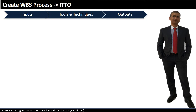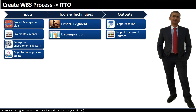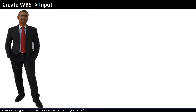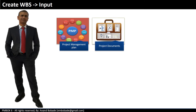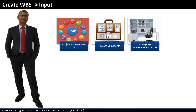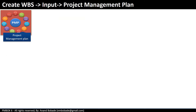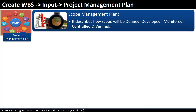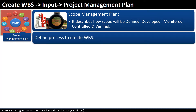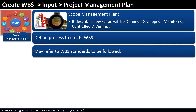Let's take a look at inputs, tools and techniques, and outputs. One of the key tools and techniques we are going to learn here is decomposition. The inputs are project management plan, project documents, enterprise environmental factors, and organizational process assets. The most important component of the project management plan that is input to this process is the scope management plan. It describes how scope will be defined, developed, monitored, controlled and verified, and it defines the process to create the work breakdown structure. It may also refer to WBS standards or rules used for decomposition.